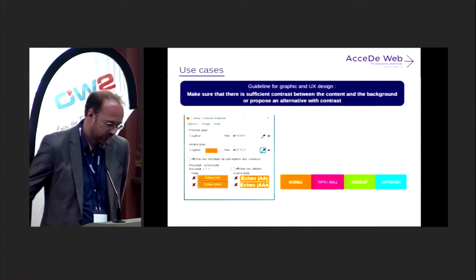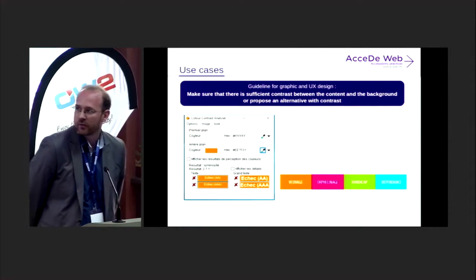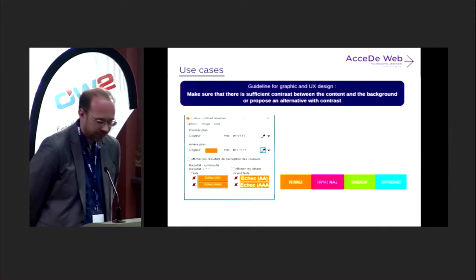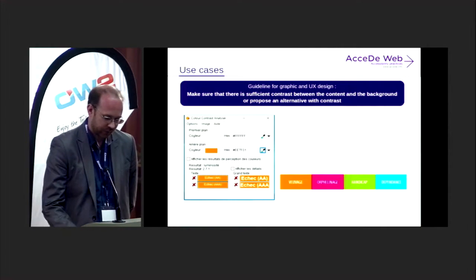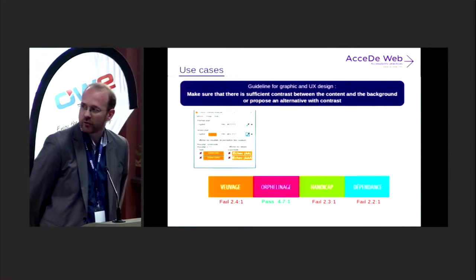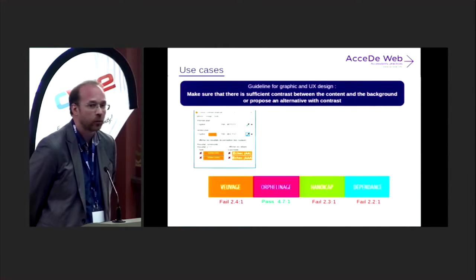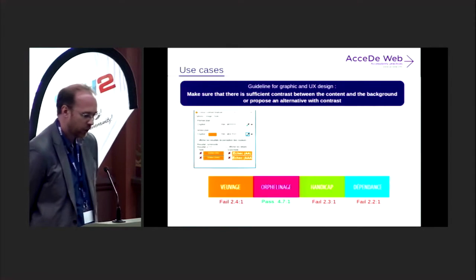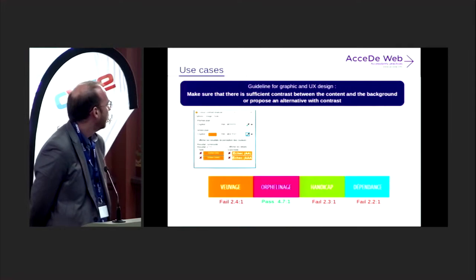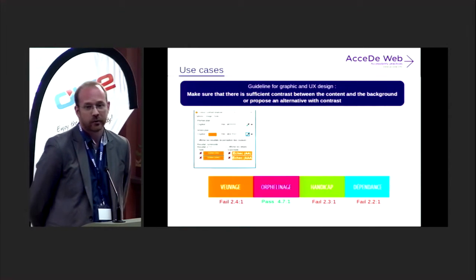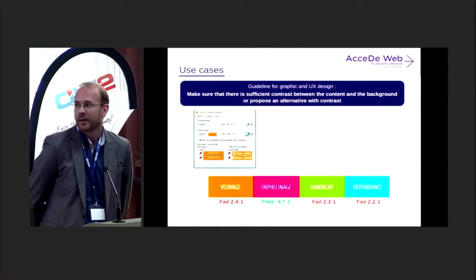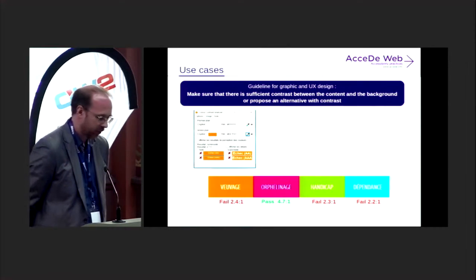So our designer used a simple color contrast analyzer tool that is free to download online, and you have the link in the guideline, to check all those colors. And well, we were failing on the orange, we were okay on the pink, failing on the green, and on the blue. So at the design stage, the designer was able to warn the project manager and to go back to see the client and ask, well, what should we do about this? Because we're not going to be fully accessible if we keep those colors.